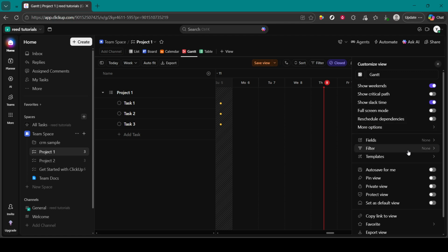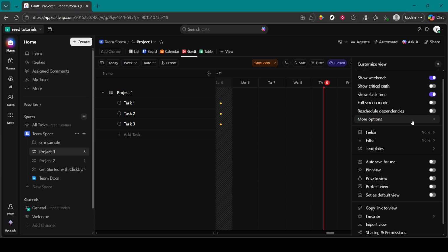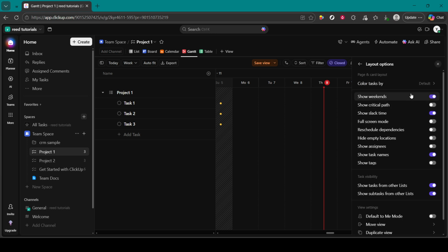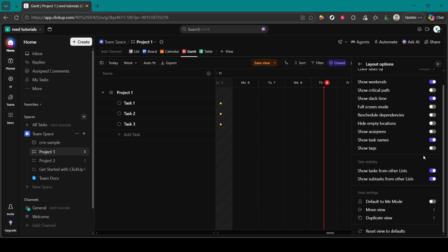If you open the project menu, you'll see your tasks organized by list and status. This is your reference point. The Gantt chart reflects whatever is in that task list, so it's helpful to make sure the right section of the project is selected and visible. If you don't see anything on the timeline yet, it usually means tasks don't have dates, which we'll add next.